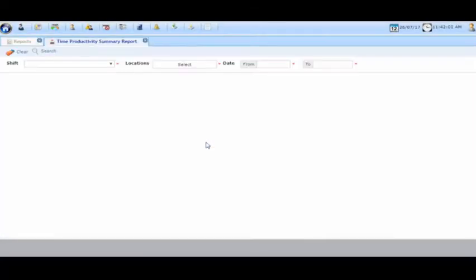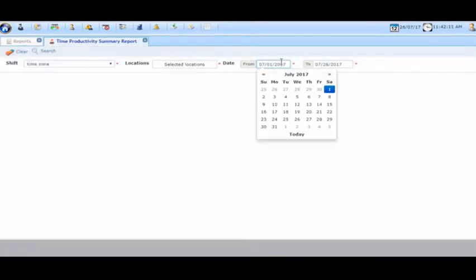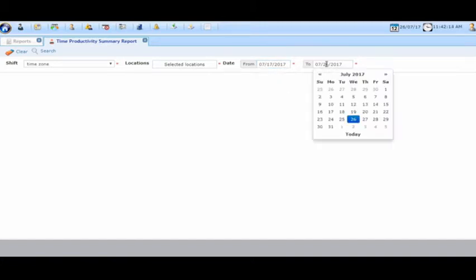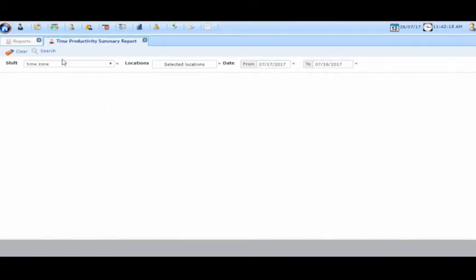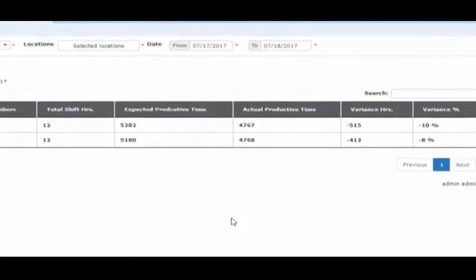By implementing RFID, we managed to convert manual, cumbersome systems to a digital system. Before, we were getting the information too late, and with the RFID labor-based system, we're able to get real-time information. We're able to adjust resources accordingly, and we can see where we're losing money or making money immediately. It's been hugely beneficial, and we've identified that about 30% of our resources are in unproductive zones. So we're now implementing measures to reduce that as much as possible and overall improve the profitability of the company.